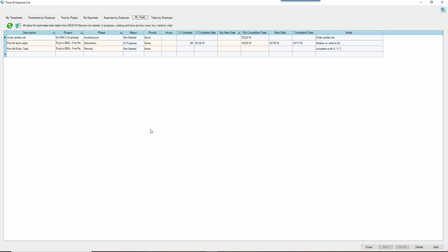Project managers are always the production bottleneck, so as much as you can, try to teach your employees to add these tasks for you, although they may not have access to the Project Command Center. As much as you can, delegate those tasks down. So maybe have a weekly staff meeting and say, I need you to do these 3 things on this project this week, and expect that the engineer would go back and add those 3 things with the start and due dates within the Project Command Center, so the project manager is not typing in Project Command Center all day.